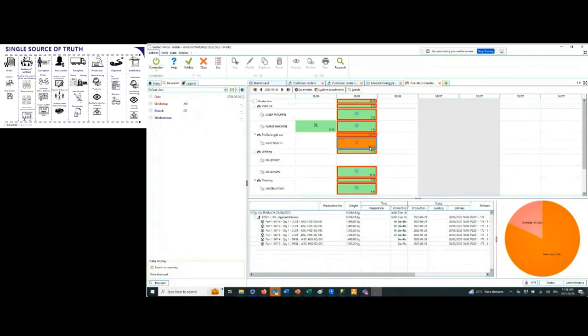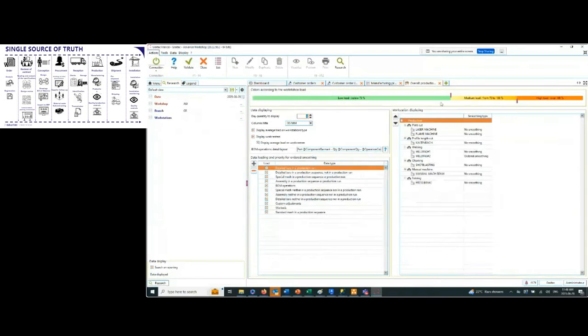Of course, the theoretical times can be more conservative, so that if you do have a scenario of this type where you need to execute everything in one day, you're looking at the worst case scenario, not a less conservative time frame, if that makes sense. I digress. Okay, so from here, I'll change my parameters back.